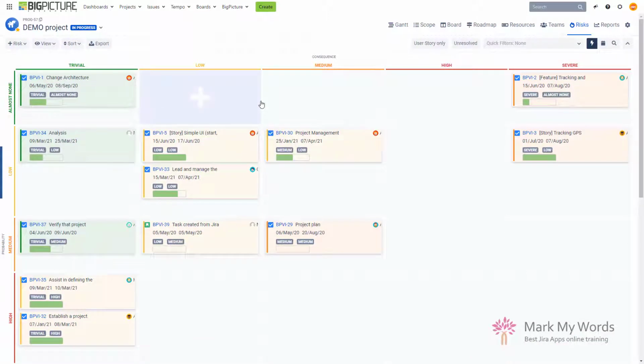The second approach is that you create your own issue type, a separate, new one that is exclusively assigned to being a risk. And that's the approach I like because it gives you a very nice distinction between normal Jira tasks and the risks, right? So you of course still have the possibility of assigning the risk to a normal Jira task, but by just creating a separate issue that will be the risk itself, at least for me, it gives you more freedom.